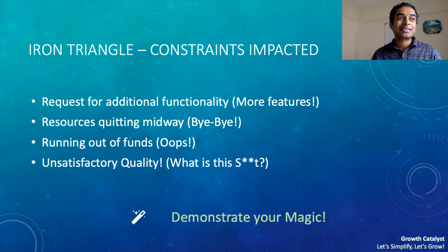So whenever there's a quality challenge that happens, you then have to make sure that this is made better. It could actually mean all three things. In fact, you could be putting in better resources. You could be taking a stock check on the scope. Okay, do I need to increase or decrease scope? Should I be adding a different functionality that is exactly what's being requested? And you could also be looking at the timelines. Can I shrink or can I extend the timelines to make sure the quality is better this time? Can I include one more testing cycle which will impact the time again?